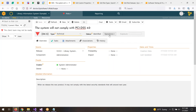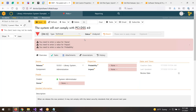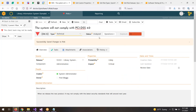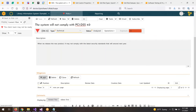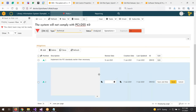You save this and now have a new risk. The next person would log in and analyze the risk. When they hit save, it warns them they have to enter some values — they must assign it to someone. I'll assign it to Fred to own, then assign a particular probability. It's likely that standard is going to come about and it's critical if that happens. That's a pretty high risk. Fred may then review it and add a mitigation. One mitigation might be to implement the PCI standards earlier than necessary.